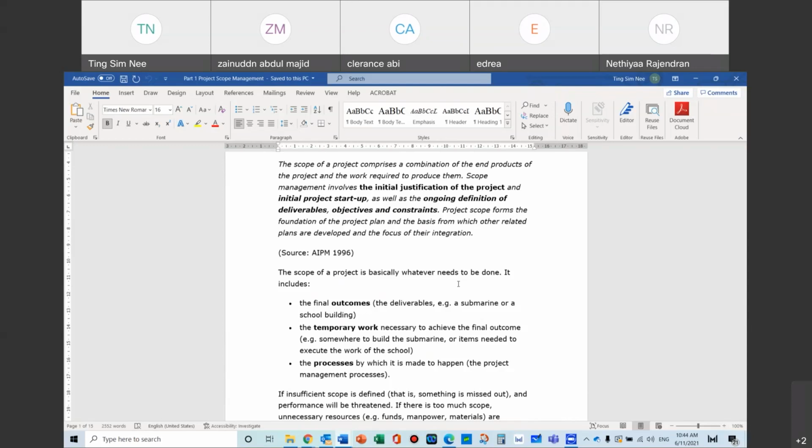When I say scope, it's just a very big thing. And when I say project scope, then it's going to be that particular project. So inside there, I'll be worried about the actual work, actual activities, actual things that must be delivered. Like even buying concrete, buying bitumen, having a roller, whatever must be there. Those are what I call project scope definition. Okay? So that is project based. So you need to get this very clear.